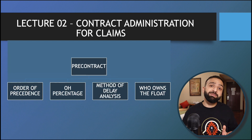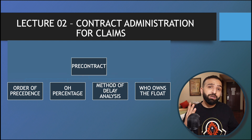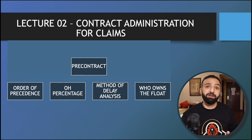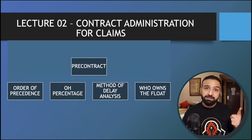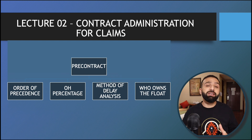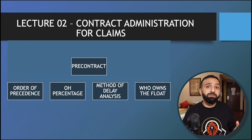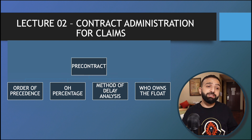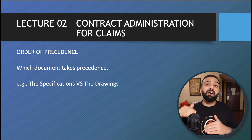At the pre-contract stage, there are four very important things that need to be considered and implemented in the contract agreement: the order of precedence, the overhead percentage, the method of delay analysis, and the ownership of the float. If these four things are defined properly in the contract, then the job of claim preparation becomes very easy.